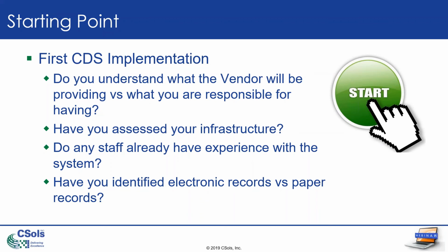If you have anybody internally on your staff that has either used different CDS or have used CDS in general in the past, that can be very helpful to providing insight to how to implement the system, and especially when it comes to things like training or developing documentation. So knowing up front before you get a good way into the project what experience level you have will help you understand how you need to staff your project team.